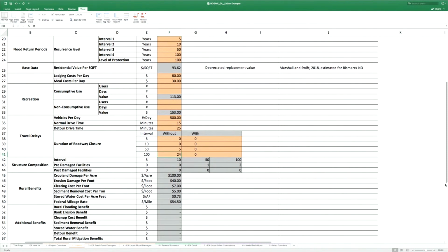If you have to evacuate a nursing home, that's part of the economic analysis. There's a cost to that. You also have to include the benefit to the persons in the nursing home from being evacuated. It's the most excitement they've had for years. Okay, but there certainly is a cost to evacuate them, to put them up for 2 weeks, and to bring them back again. That's a legitimate part of the costs averted.